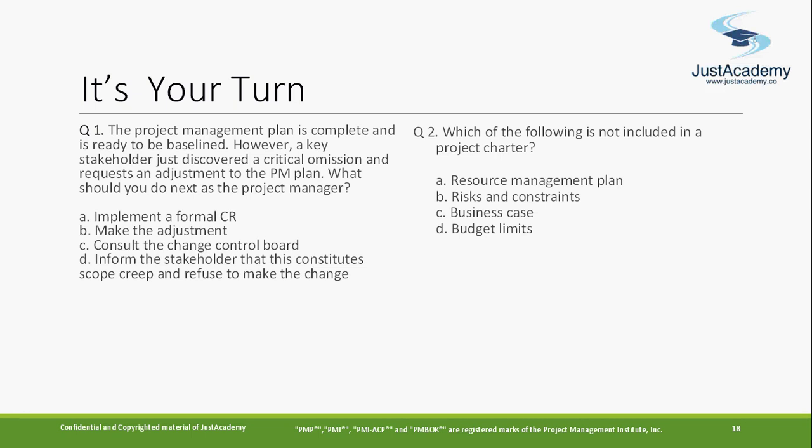Once the project is finalized and enters into the execution phase, after the execution, when you come up with new changes, then consult the change control board or have a discussion, and go with integrated change control. That picture comes to mind. Here, make adjustment is the best fit for this answer. That's why this is a very important word, ready to be baselined. So the question needs to be read carefully, and don't make a quick decision.